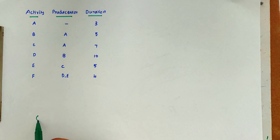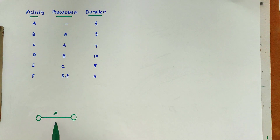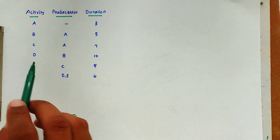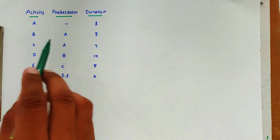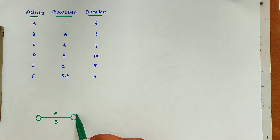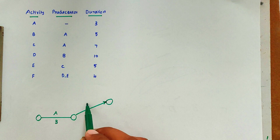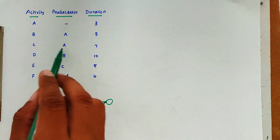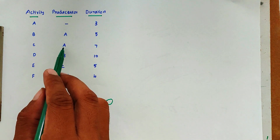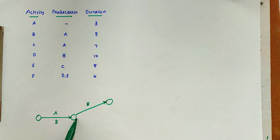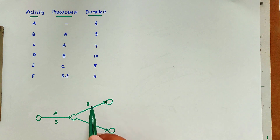We draw activity A with duration 3, and since it has no precedent activity, it starts the network. For activity B, activity A is the preceding activity, so we draw B after A. Activity C also has A as its preceding activity, so we draw C branching from A as well.